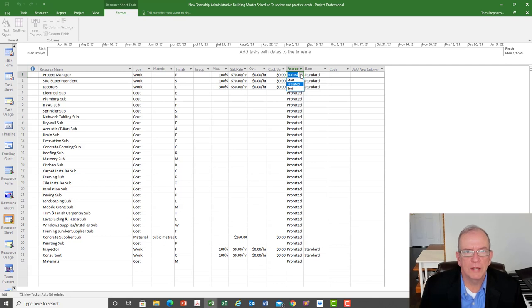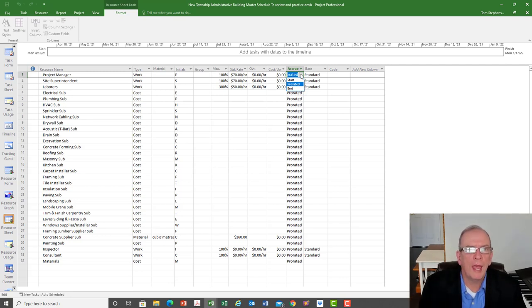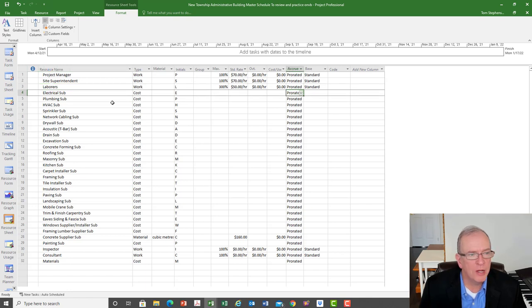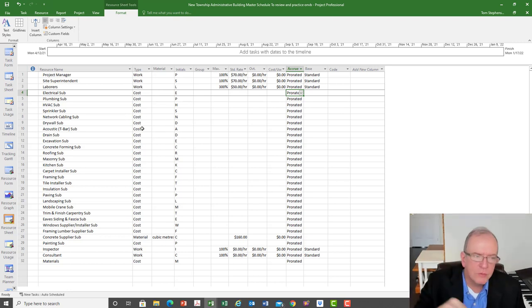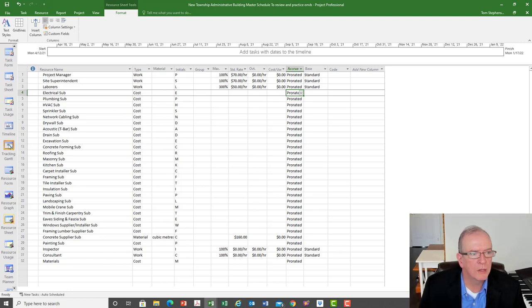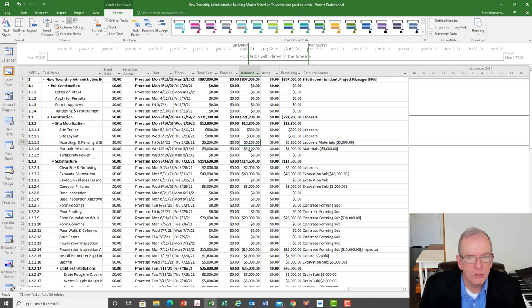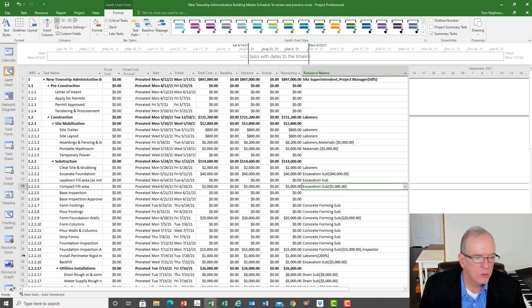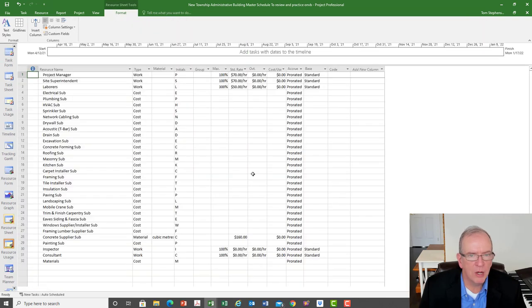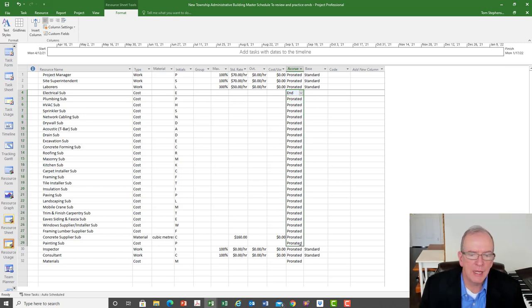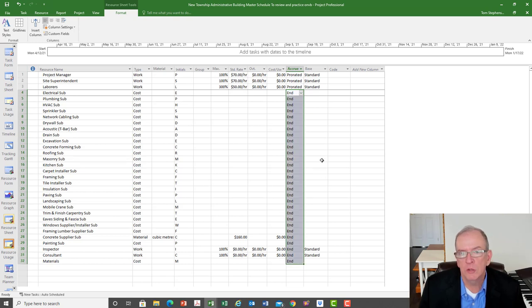For subcontractors entered as a cost rather than work, I put lump amounts on specific activities. I might want to pay them at the end of their activity rather than prorated — if an activity is 20 days, I'm not paying them on day one, I'm paying them after 20 days. Setting them to 'end' means the software calculates payment at the end of that activity, which is helpful for tracking when money actually leaves the company.